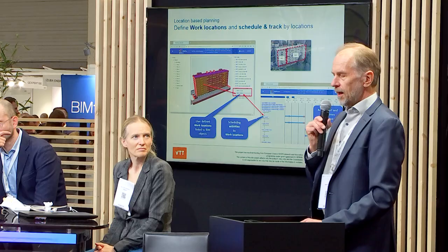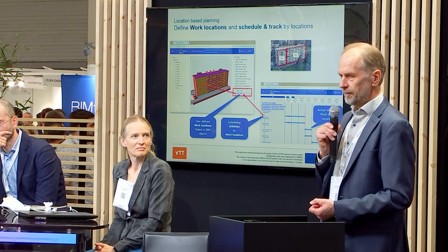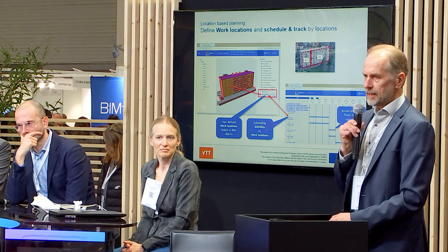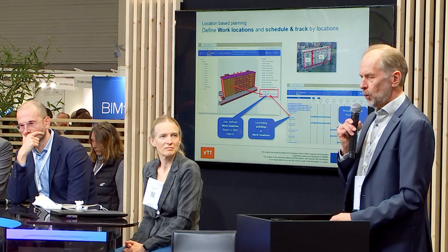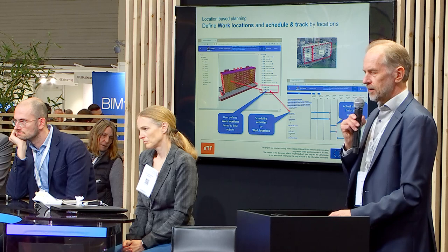I will concentrate on some issues or topics in this presentation. As I said, the idea is that the master schedule, which is agreed with the contractor and the owner, is downloaded and used as the starting point. It may be detailed with some sub-activities, but especially with predefined work locations where, in this case, the facade renovation is going on. One facade is divided in two parts, and the activities are scheduled separately on those locations.